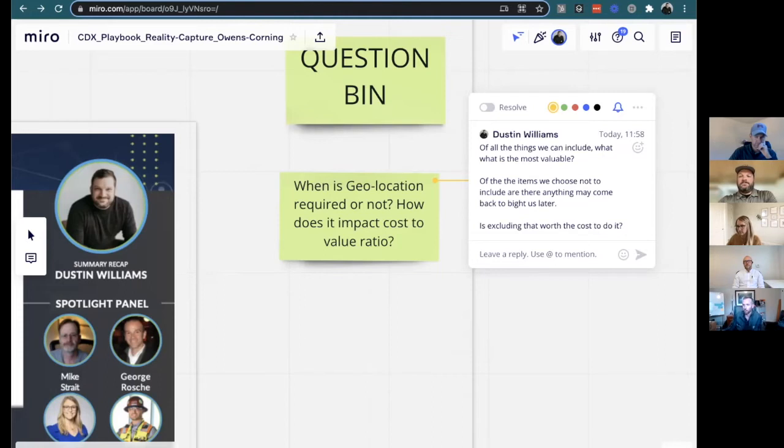But if I can know right then that they've been installed and either commissioned, and some things don't even have to be commissioned, once they've been installed, you can start depreciating that good. That can be like a capital benefit. So the earlier you know that thing has been installed, the better off you are as an owner, because that can affect your capital budget for that year or the following year. Just things to, I'm throwing that out there. But I think you're right.